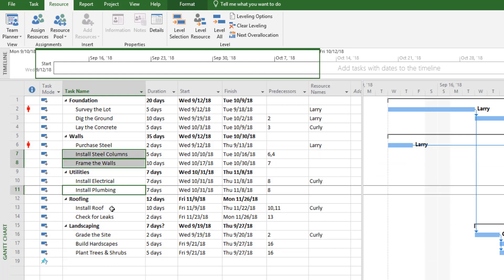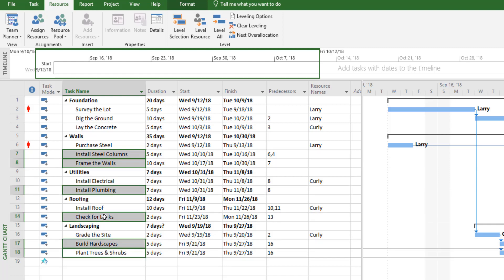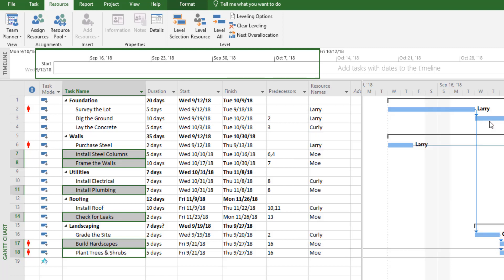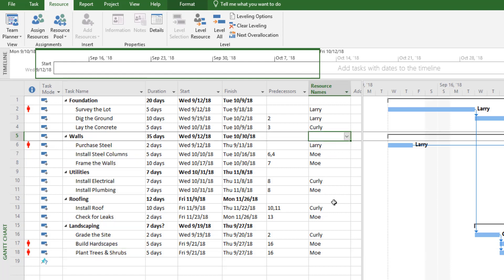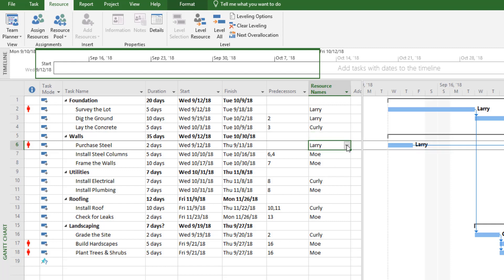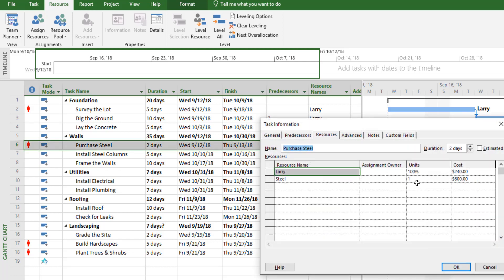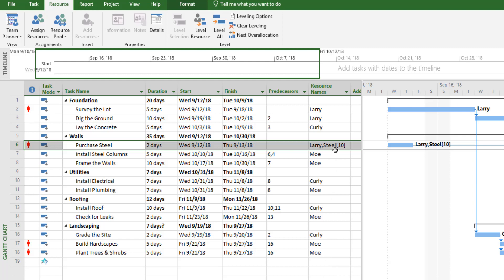Then I'll assign the remaining activities to Moe. Now let's assign the material resources. For the purchase steel activity, I'll designate how much steel is needed — I can select that activity, use the drop-down, and check steel. It defaults to one unit, but I can double-click the activity and under the Resources tab change it to 10 tons of steel, so Microsoft Project calculates the cost based on ten tons rather than one.